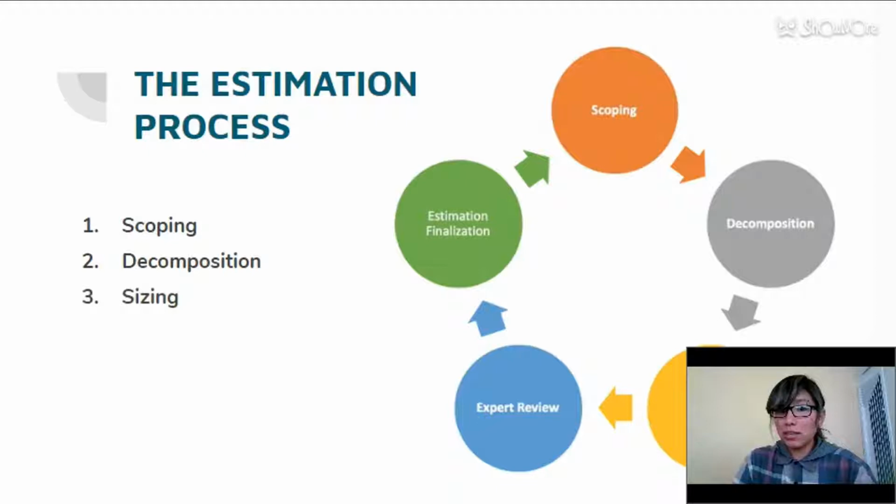Size is generally the most significant, but certainly not the only, cost and schedule driver. The overall scope of a software project is defined by identifying not only the amount of new software that must be developed, but also the amount of pre-existing software and other software that will be integrated into the new system. In addition to estimating product size, you will need to estimate any rework that will be required to develop the product.